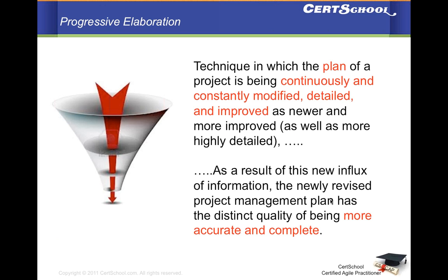Okay, but in general, we must keep in mind that progressive elaboration is different than scope creep. A lot of times people confuse those two things. A scope creep is something that happens when you have planned for something, or you had defined a clear, crisp scope when you started working, or started developing, or started implementation. While you were doing that, the scope got added. You were requested to add more features or add more functionalities. Okay, that is a scope creep. Whereas progressive elaboration is a more positive, more broader concept, which is planned, and which is something that is continuous in your project lifecycle.